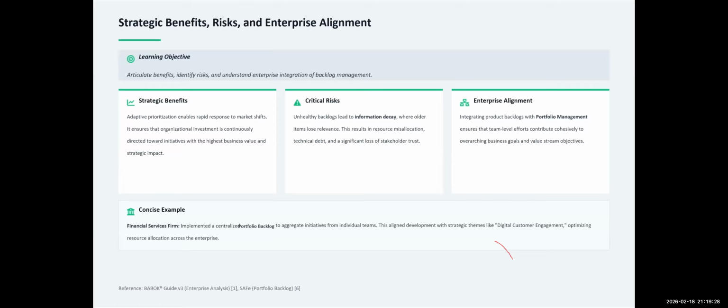But you can have a product council, where 3 people need to align before an item gets into the backlog. So whoever is bringing it must come and defend the item before they just dump it into the backlog.